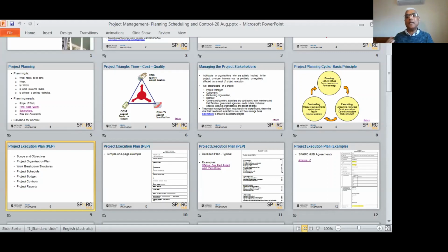Or you can have a combination of the work breakdown structure, a matrix implementation of the work breakdown structures, with everything included into the headings. And then this work breakdown structure, when the cascading effect, these can be considered as the cost centers. And these activities and the work groups are costed. So when you prepare the budgeting, those budgets are prepared based on these work breakdown structures and the cost centers. That's what I said earlier.